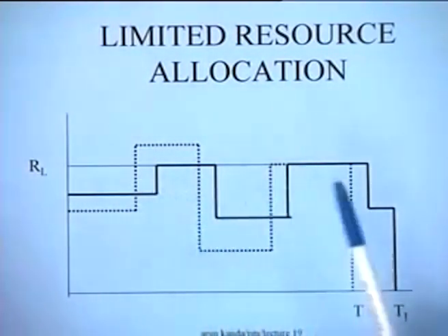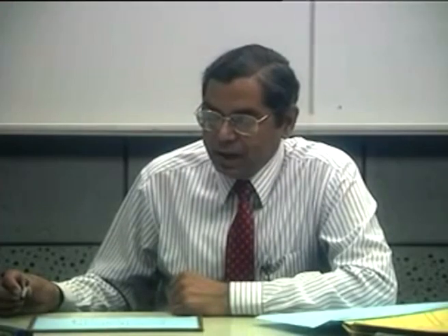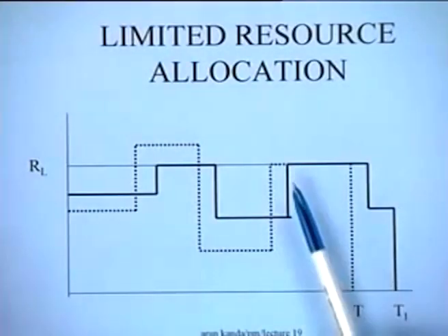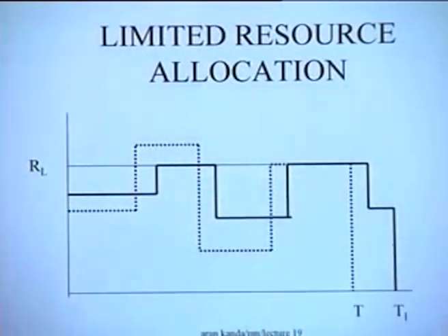There could be not only one resource, but in fact multiple resources, and we are trying to find a particular value of the duration such that all the resource availabilities are satisfied. So, essentially this is the problem. As opposed to this, mind you, resource leveling is often referred to as unlimited resource leveling, because there we are not specifically concerned with the availabilities of the resources.